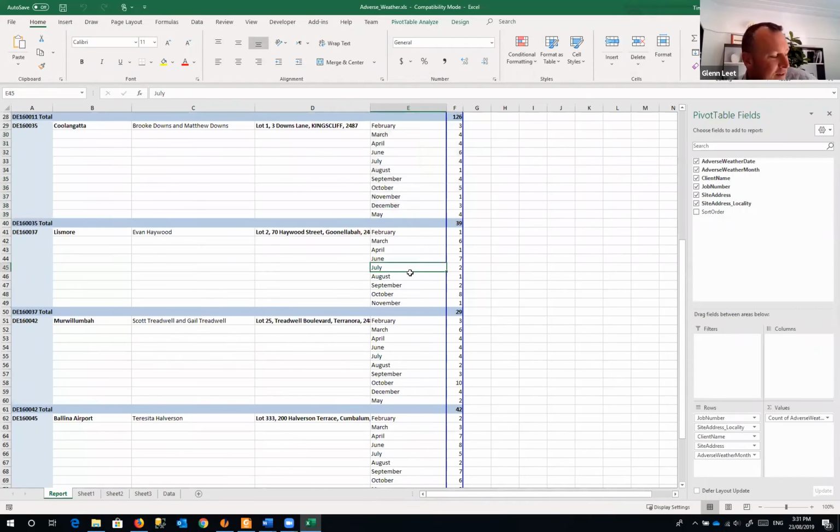Yes. So the beauty of these numbers, of course, is there's no grounds for dispute with the client. The numbers are real. They come from an independent website. They're not just out of the supervisor's diary. So it does help reduce the incidence of liquidated damages claims. If there is a dispute, all these numbers do match the Bureau 100%. So you can point the client in the direction of the Bureau and they can look up the weather for themselves if they're disputing what we're saying, and all the data will match.